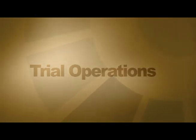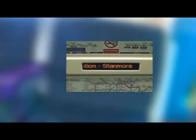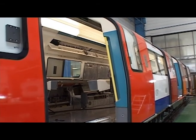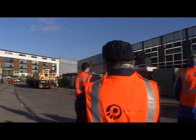When the London Underground Engineering Directorate representative confirms that all the specified infrastructure and other works are complete and fully tested to their satisfaction, London Underground Operations will then start a planned period of comprehensive trial operations. It is expected that these trial operations will last for around 4 hours, but it may be decided to reduce or increase this period and the number of different tests carried out, depending on the results of the infrastructure works and system demonstration testing. Each station will have an observer posted to it during the shadow running testing to check the tests and report any problems to the trial operations manager.